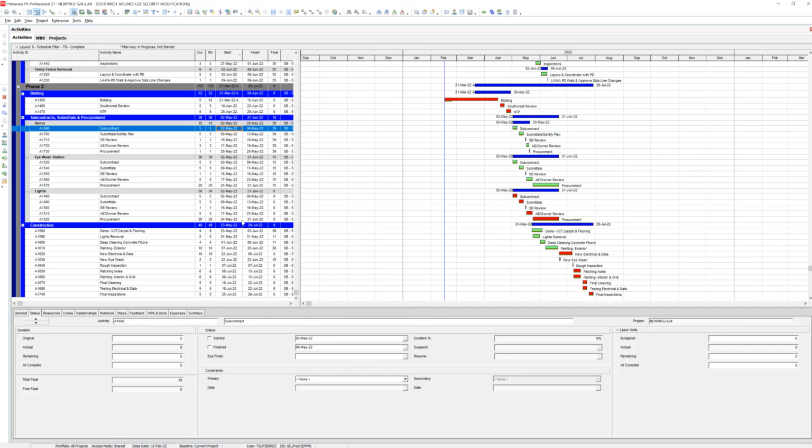You see? Because of the lights though. Yeah, and look, I have the exact same start date, May 23rd. It's the procurement, bro. Look, I can see it. You can see, look at the red lines. What's critical? Those are all timed to your lights. Your electrical sub, because the lights take too long and you can't get your new electrical and data in because you don't have those lights. And that's why I say procurement of lights and procurement of eyewash stations. I knew it was going to drive your schedule, right? That's why I told you to put that in.